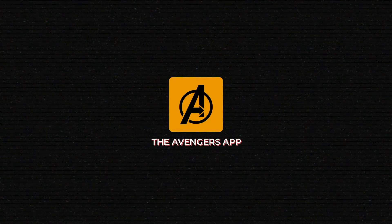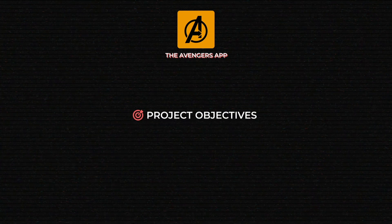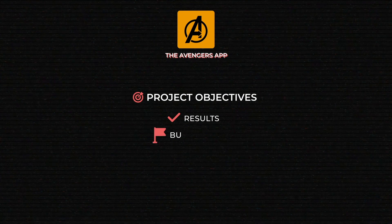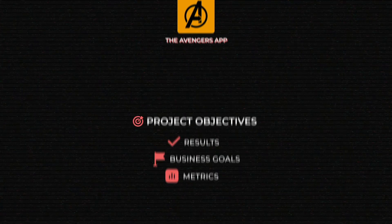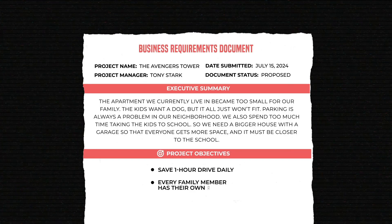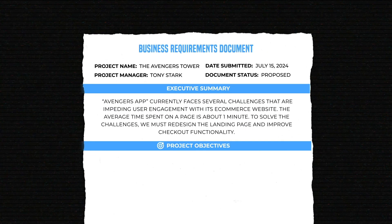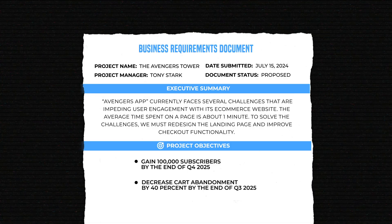After you outline the high-level scope, the next section to fill out is the Project Objectives. This part must describe the results you expect to achieve and how they contribute to your overall business goals. Also include specific metrics to measure project outcomes. For building a house, the objectives can be 'save one hour drive daily' or 'every family member has their own room.' For software projects, you might write something like 'gain 100,000 subscribers by the end of Q4 2025' or 'decrease cart abandonment by 40% by the end of Q3 2025.'